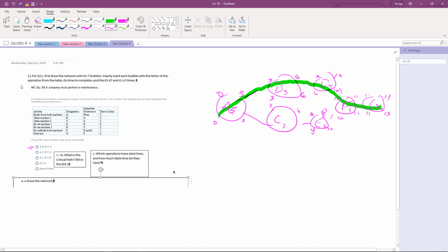So see how we could start? The early start can start at 6. The late start can start at 8. So you can start at day 6, 7, or 8, and get done in time for week 10 to catch up to the other northern path, which is the critical path. That's the slack time. Okay, so we'll carry 8 back here. 8 minus 3 is 5. So again, we have 2 weeks of slack here.